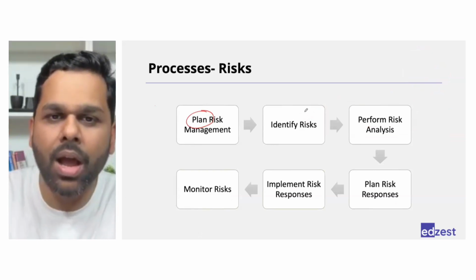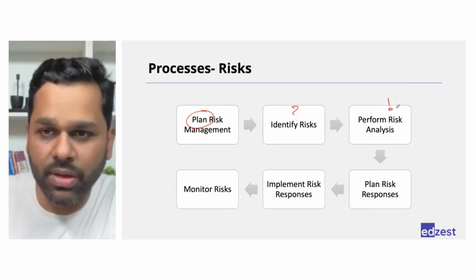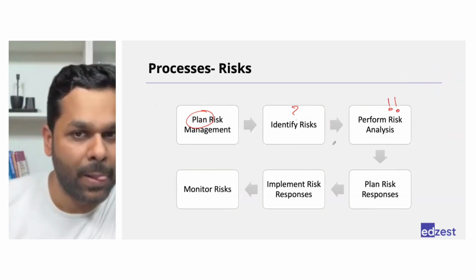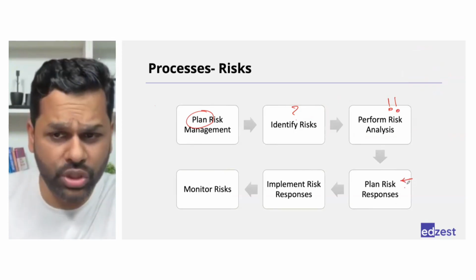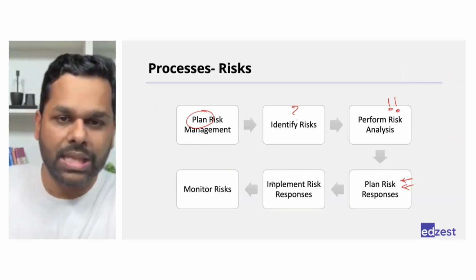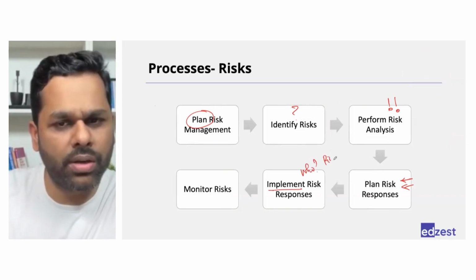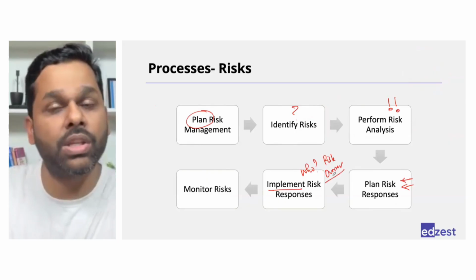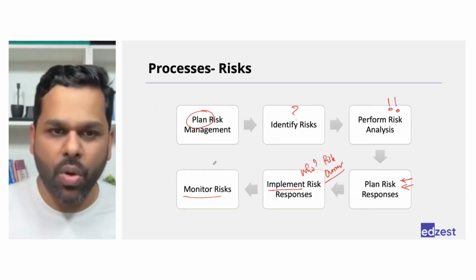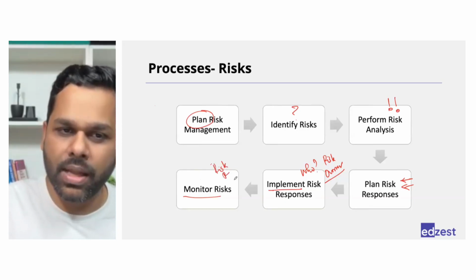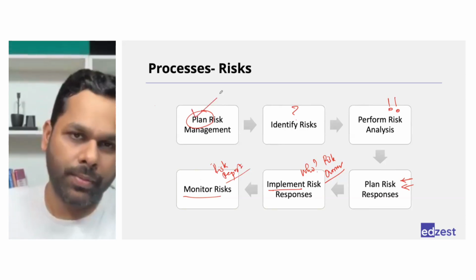What will be there in the plan? How we will identify the risk? Which techniques we will use for qualitative analysis? Which techniques we will use for quantitative analysis? How would the risk responses be? How will it be reported to management? Do we need to share with the management? Then while you are implementing the response, who will implement it? Who is going to be the risk owner? Who will be responsible for ensuring that these responses are implemented? Then monitoring the risk. How will you do that? What type of risk report will you create? How often will you share it with the customer? Everything will be there in the plan for you.